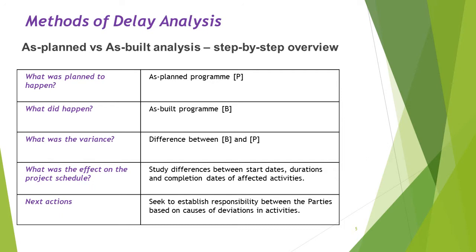Looking briefly at As Planned versus As Built analysis, a step-by-step overview: What was planned to happen? That is P, the as planned program. What did happen? That is B, the as built program. What was the variance? Clearly, the difference between B and P. What was the effect on the project schedule? Which may or may not be the same as B minus P. We study the differences between the start dates, durations, and completion dates of affected activities. The following action is to establish responsibility between the parties based on the causes of deviations in the activities.